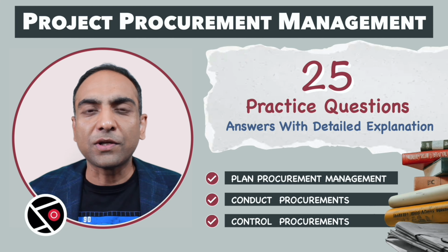C. Enforceability of a contract is a risk for both the buyer and the seller. To reduce this risk, all terms and conditions, including jurisdiction, governing law, and the contract's effective date, should be clearly mentioned in the contract. Correct. Enforceability is indeed a risk. Terms and conditions, such as jurisdiction and others, are designed to reduce this risk. C is a correct statement.